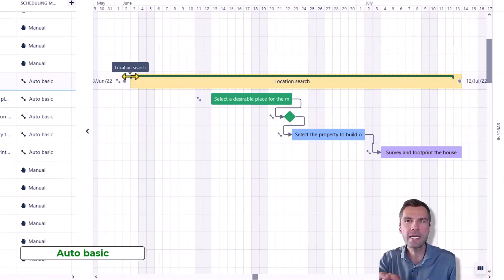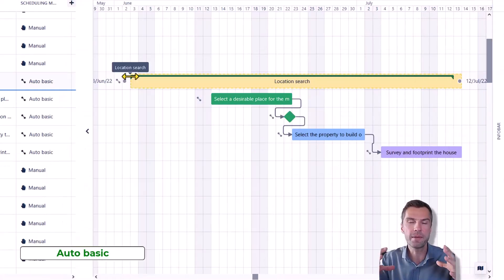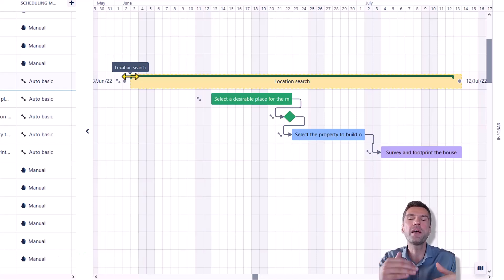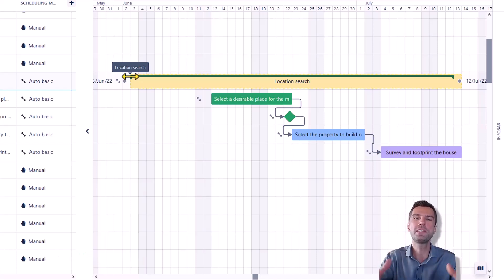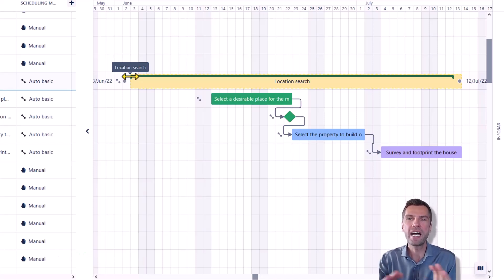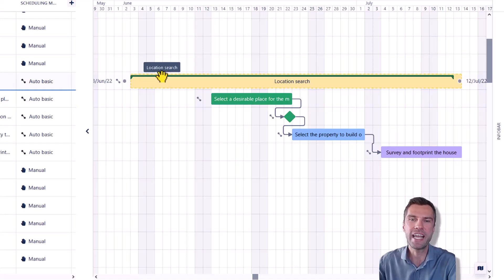Auto basic, it's something between automated. I mean, it's still fully automated, but the rescheduling of the parent or restriction from the top-down planning are now disabled.